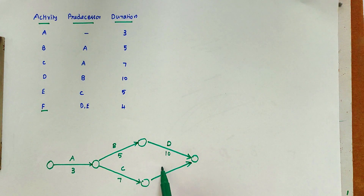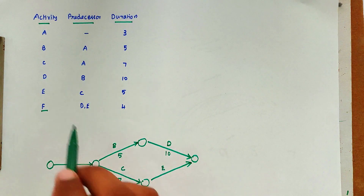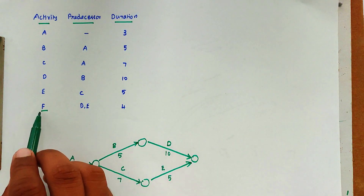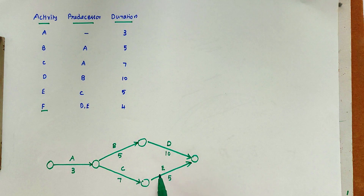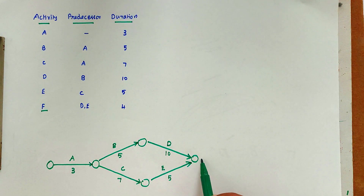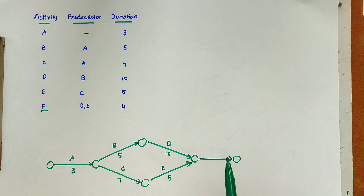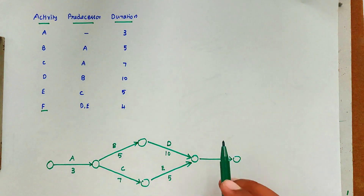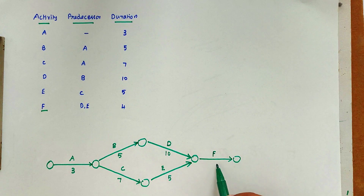We draw activity E like this. The duration of E is 5. Then we draw activity F, whose preceding activities are D and E. In order to minimize dummy activities we draw it like this — the main rule in CPM is to reduce dummy activities in order to reduce the network paths. Activity F has duration 4.